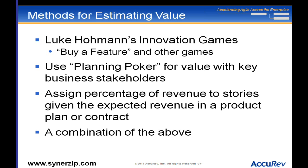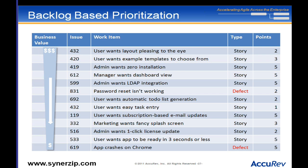That's the most important point. Let's look again at our backlog. We've done all this work to better figure out where the value is and separate it out. The idea is: most value at the top, least value at the bottom. Once I have this backlog, this is the order I should ideally deliver it in. I also have my story points, so I can go a step further.